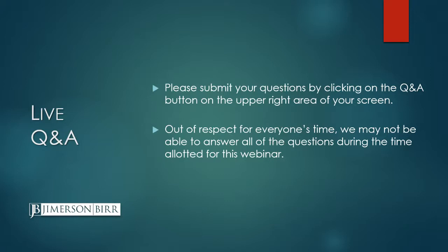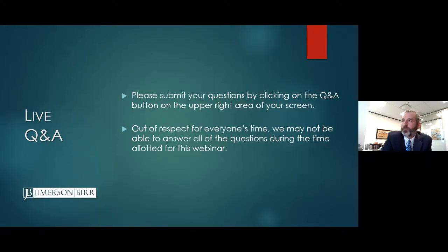I would say in general, I would recommend doing a pass-through agreement, because you can lay out in the agreement the important terms of who's going to be responsible for prosecuting the claim. Make sure you have the obligation for the contractor to prosecute the claim with your assistance. Who has the right to settle the claim? You want to make sure that you have at least approval rights on the settlement. And then how are the claim recoveries going to be split up and paid? Is the contractor entitled to overhead and profit on your claim?